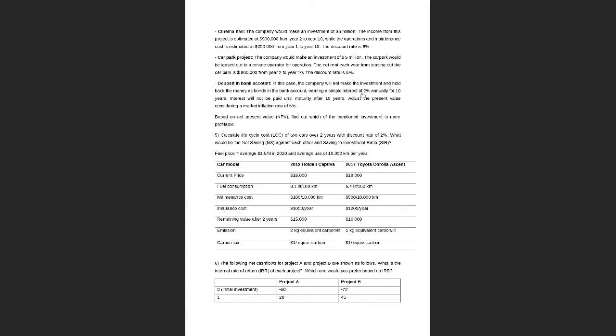Yes, as I told you, you will be getting some profit every year, but you won't be paid out this total amount before the end of 10 years. Because here we are not only concerned about finding the return of our investment, but we are also concerned about at what point of time you will be receiving this money. If you would have received this money earlier in the time period, then that value will be something completely different. But here it clearly says that the interest will not be paid until maturity. That means even though you're earning some interest annually, the accumulated amount will be paid to you only after 10 years. I hope that is clear.